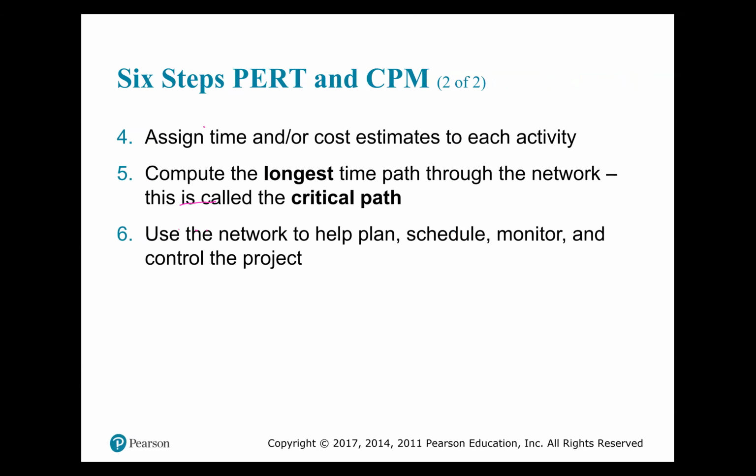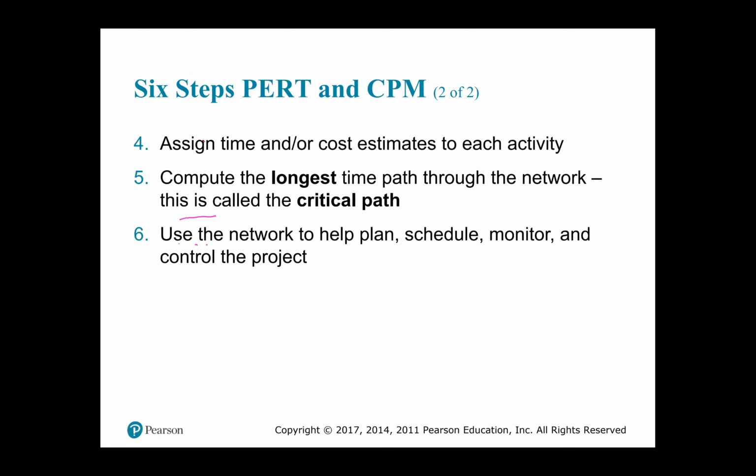Here, we're basically interested in assigning the times. We're not going to be using the cost estimates. You become interested in cost estimates when you're going to do something called crashing the project. But we're not going to be crashing the project, so we will just focus on assigning time to each activity.